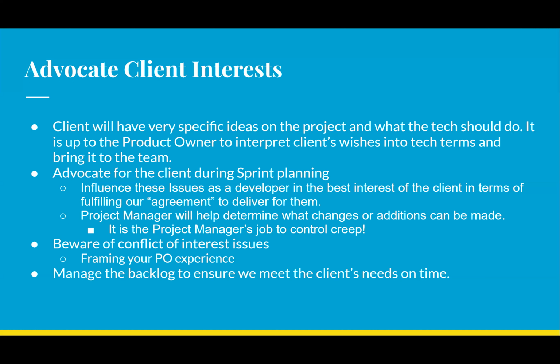Basically, don't let too much time go between contacts. If we're in a heavy development period, you're going to definitely want to be talking to your client at least once a week, if not more, depending on what's going on. Probably once a week is the safe bet so that you have enough to report, but not more than 2 weeks. In general, if you're working on this project during, say, a summer session, like we did prior to fall of 2023, you're going to want to make sure that you're in touch with your client at least every 2 weeks, even if it's just to say, hey, it's me.